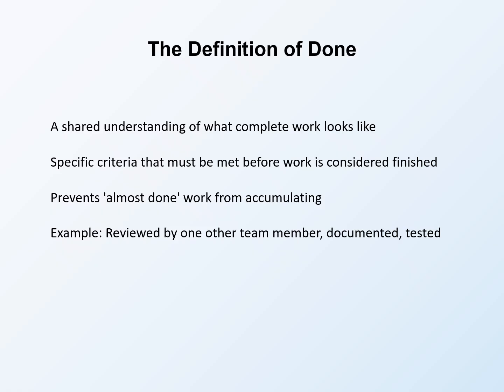For example, work must be reviewed by at least one other team member. Documentation must be updated. The intervention component must be pilot tested, whatever makes sense for your context. The key is that everyone agrees on these criteria in advance. When someone says they're done with a task, everyone knows exactly what that means.